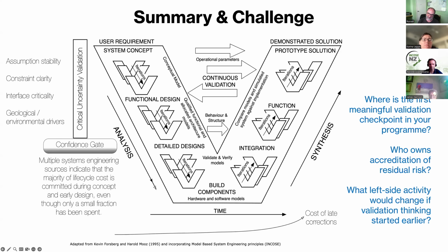And just following up on a previous statement, when you start to do iterative development, that's something you need to take into consideration when you're managing the risks, because you might make a minor technology tweak or a minor upgrade, but it may impact a workflow quite significantly or create a data quality issue, which could very quickly damage a project. And I've seen quite a few projects fail badly because they haven't accounted for the end user and the business change impact of what's being delivered. So I think I'm lining up with what Jess said, bringing the user into that space to make sure your things can be fit for purpose.